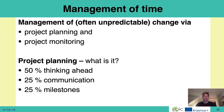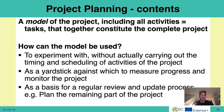Management of time is really management of unpredictable change via project planning and monitoring. Project planning is really 50% thinking ahead, 25% communication, and 25% milestones. The project plan is a model of the project including all of its activities — the tasks which together constitute the complete project. The model can be used to experiment with the timing and scheduling of different activities to set it up so that it will work the best way possible. It's also a yardstick against which you can measure progress and monitor the project.